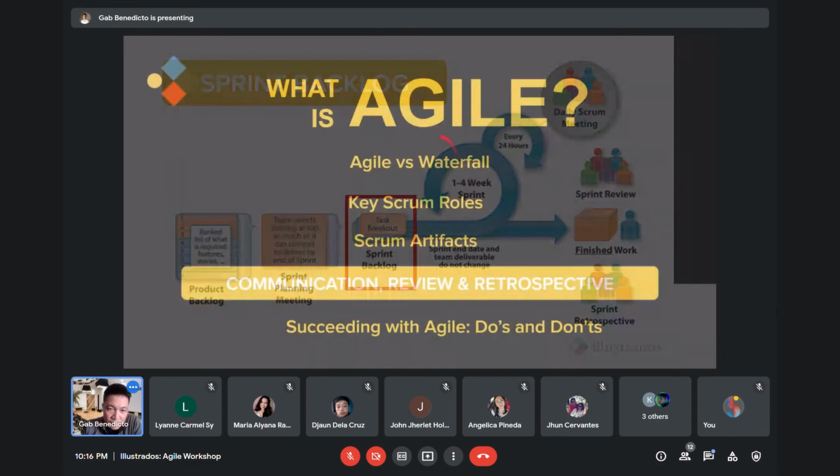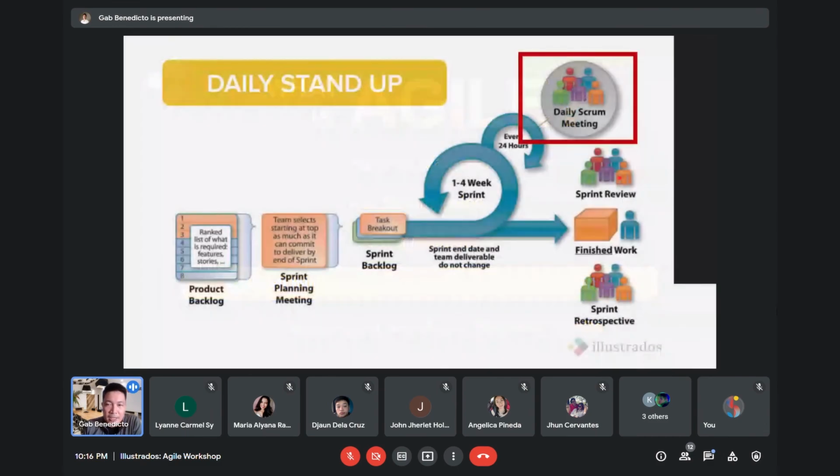Here. So, there are key meetings, as mentioned. The daily Scrum meeting is every day. I think you have attended and hear your team members every day on what they are saying: what I have done yesterday, what will I do today, any blockers. Just those three things. A Scrum meeting should not exceed 15 minutes every day. Even for yourself, when you give your status, it shouldn't take 1 minute.